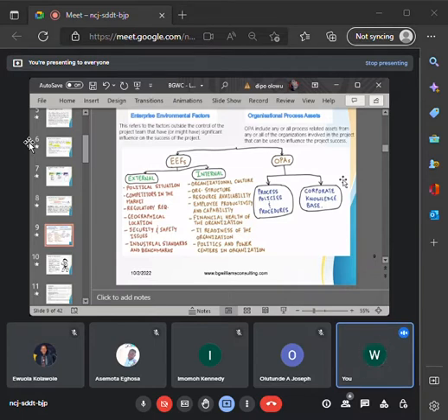So a lesson learned is a post-mortem, which means, let's say for instance, you just finished a process of fabrication. A lesson learned will say that you gather the team of members you work with and ask yourselves, okay, this aspect of the project we just completed, what is it that we did right? Everybody will tell you, oh, we did this one well, this happened, that happened. It's good. Then you ask the second question, what is it that we did not do well? Everybody will explain it. Take note, all this explanation must be written down.